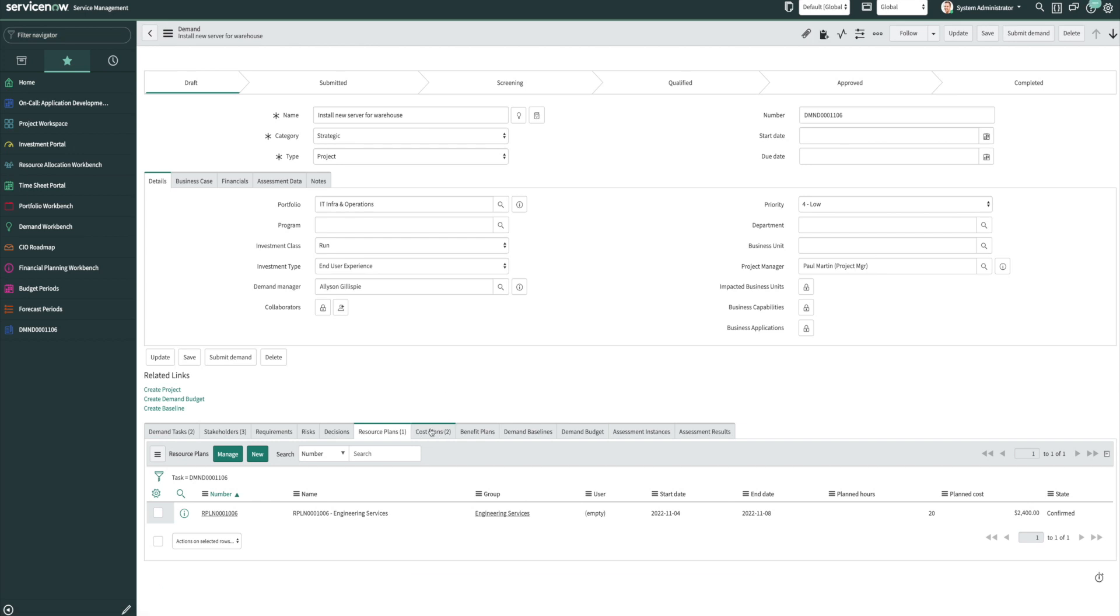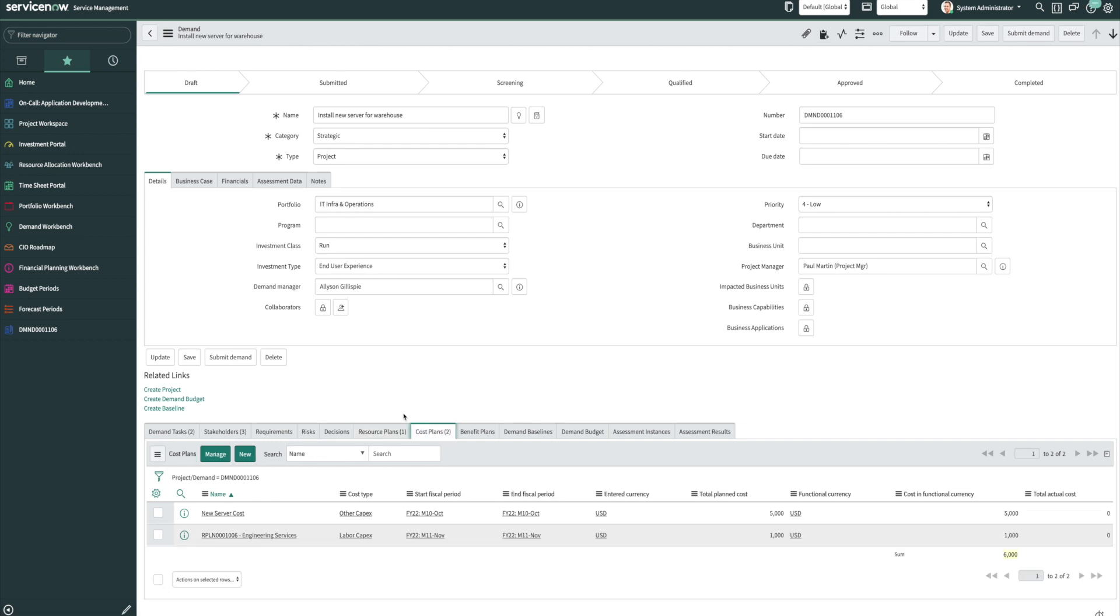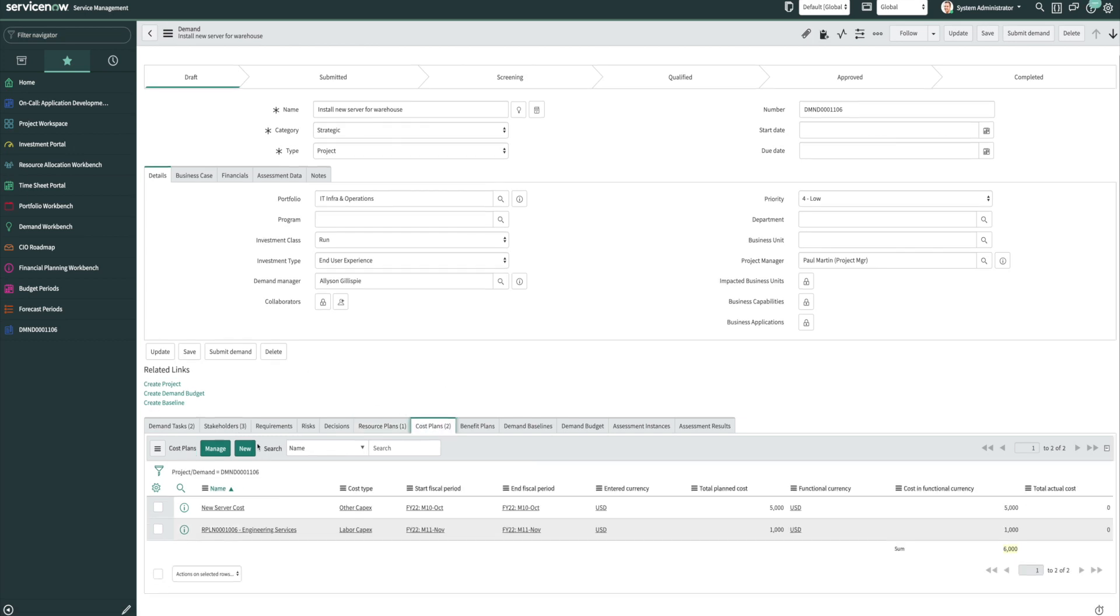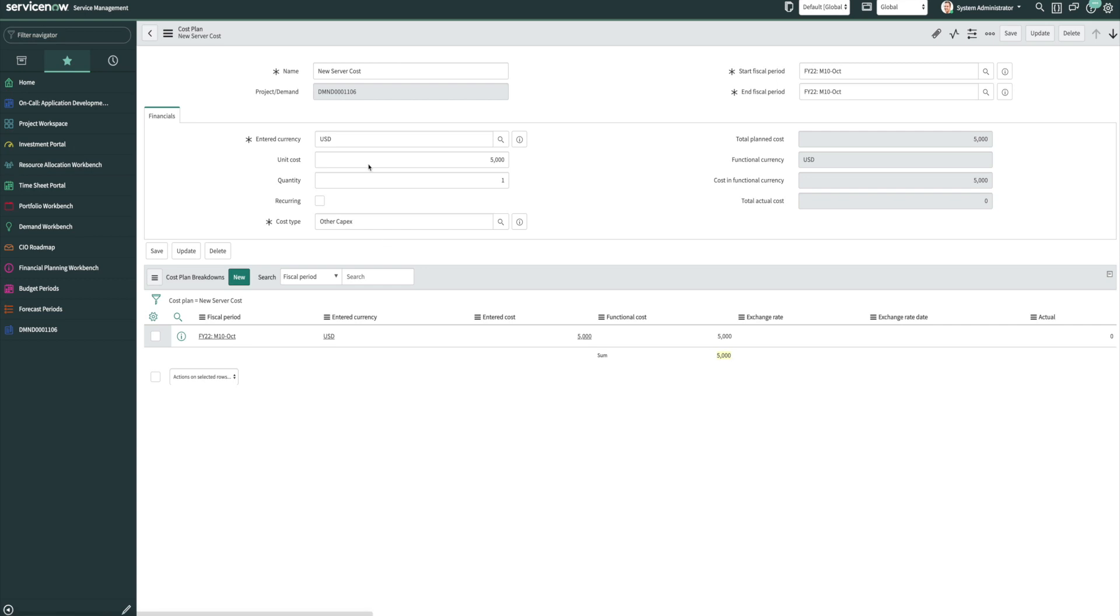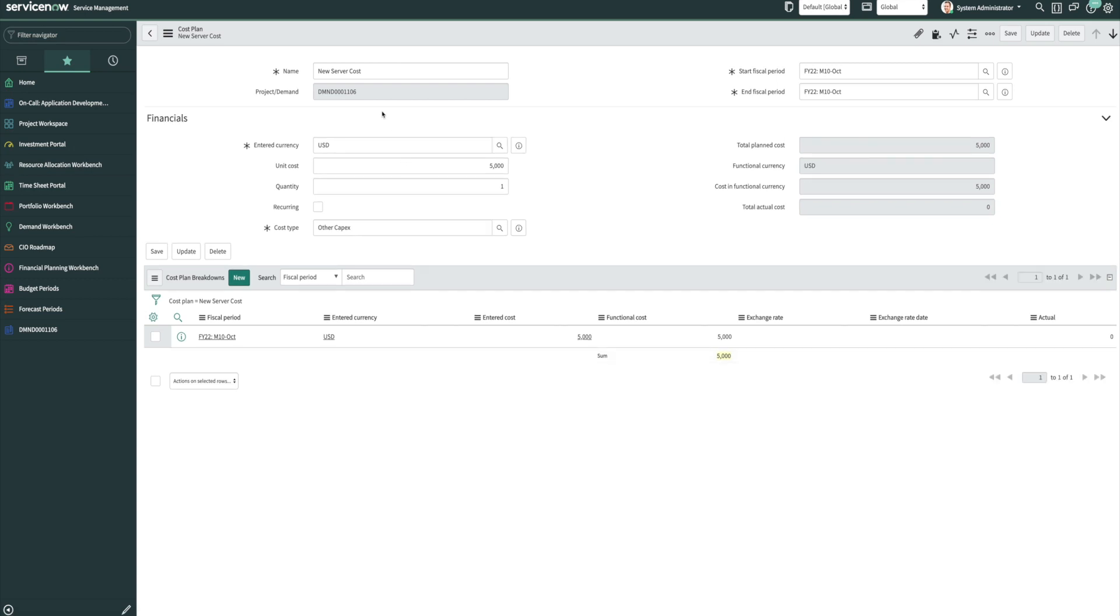Now if we go over to the cost plans, we'll see obviously the resource plan has generated a cost. And then we also have the server. So from that task this actual cost plan was generated to show the price of the server, the fiscal period of when it would be purchased in, and the overall price for it.